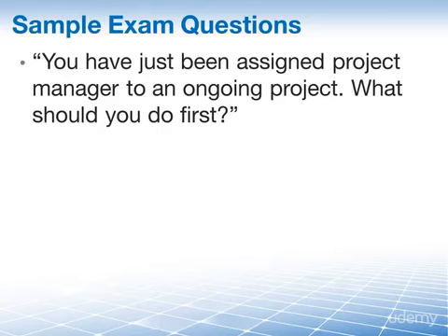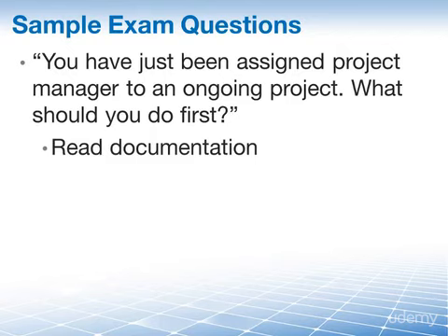And one scenario-based question that we saw was this here. You have just been assigned as project manager to an ongoing project. What should you do first? One correct answer could be that you should read the project documentation, which of course includes the project management plan.